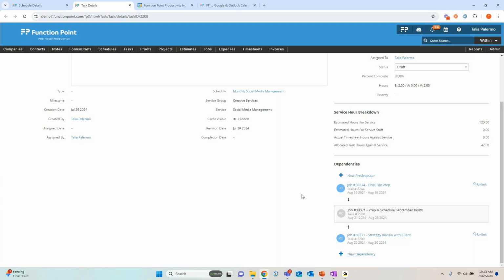Okay. I could definitely say it would depend on the agency's workflow. But if you didn't really want that, then you totally could set up your dependencies and at the beginning of work, just move all of it to assigned, and sort of forget about the draft status. Draft could be used like what you want for scheduling, but then when you're ready to go, it's locked in. We move everything to assigned, and then people just manually move them to in progress. It's almost like we would get a step ahead of it and omit draft from the workflow. And then you're bypassing that automation.